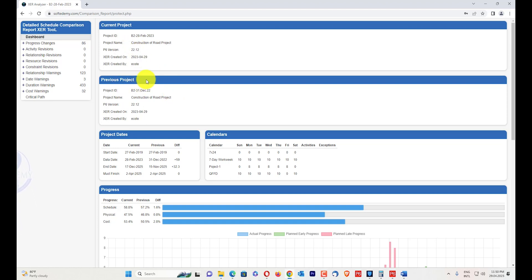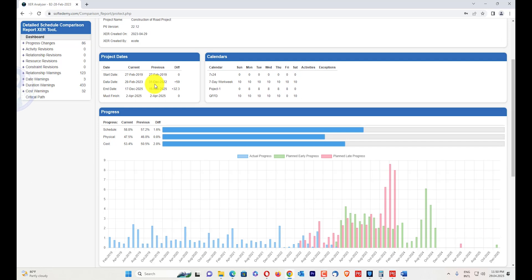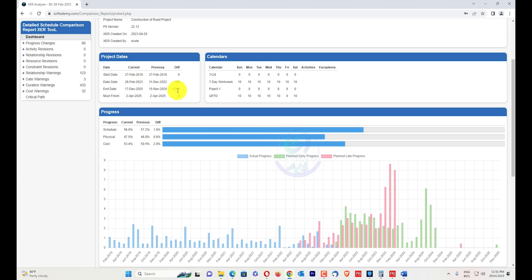After analyzing, you can see the project ID, project name, versions, created dates, and the personnel who created them. You can also see the project dates — their start dates, date differences, and end date differences. The difference shows 32.3 days of delay. A positive value does not mean the delay has been recovered; it means further delay has occurred.